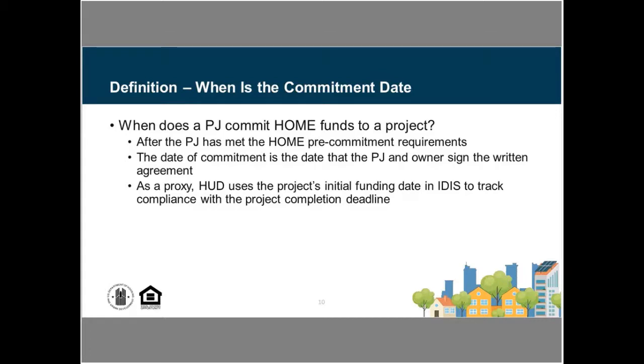Another question is, is the commitment date the same as the award date, or when the contract between the parties is executed? Well, our definition of commitment is when all of these required elements have been met: the underwriting, certification of the CHDO, making sure all the sources and uses are in place.